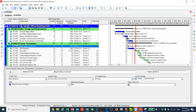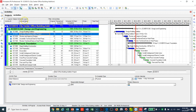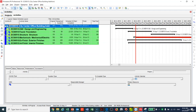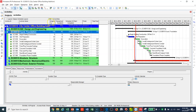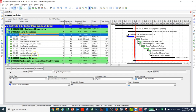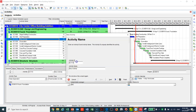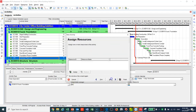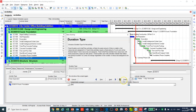Now we're in the live software, P6 version 19. You can see the version under Help > About. This is the Office Building module we're working on. I'll go to the Foundation WBS. I need to add a new activity to summarize all these activities, so I'll click the plus tab and name it LOE — Level of Effort — then click through the wizard to finish.